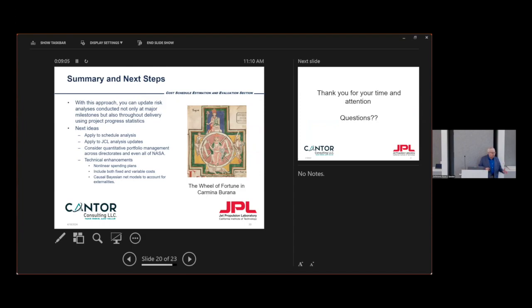As you update your actuals for individual WBS items, you get feedback for the whole project on an ongoing basis. It gives you much more continuous transparency into the performance of your project. And we do this for both cost and schedule. We gave the cost example, but the same algorithms work for time to complete as for cost to complete.